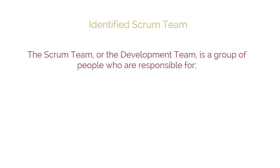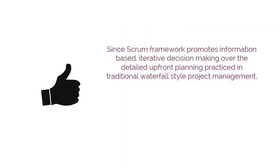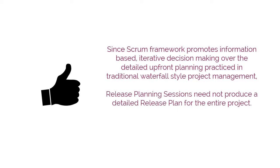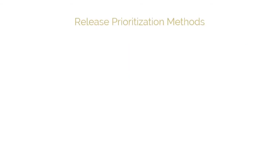The Scrum Team, sometimes referred to as the Development Team, is a group of people responsible for understanding the business requirements specified by the product owner, estimating user stories, and final creation of the project deliverables. Since Scrum Framework promotes information-based, iterative decision-making over the detailed upfront planning practice in traditional waterfall-style project management, release planning sessions need not produce a detailed release plan for the entire project. The release plan can be updated continually as relevant information is available.